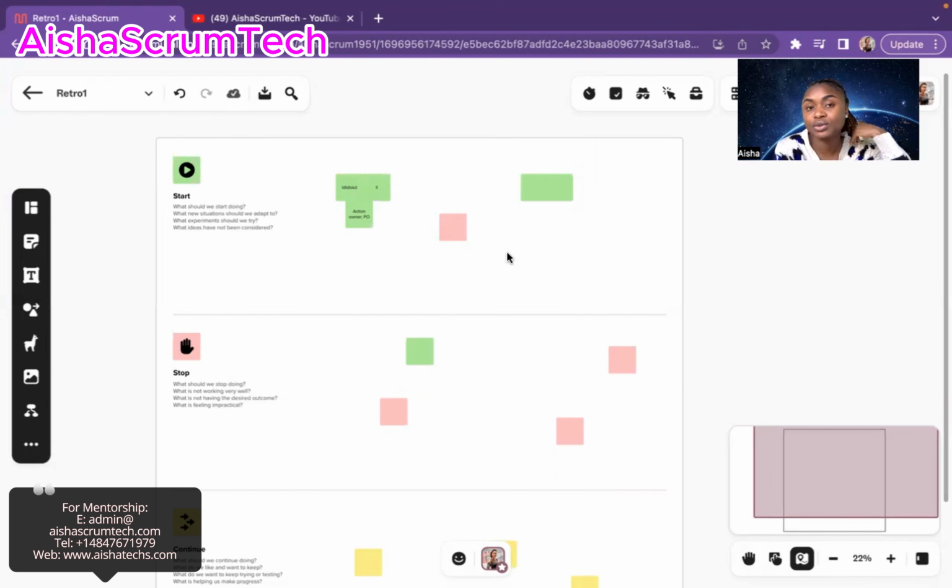It's very important to know the action owner, because later on, if you go to Jira to input that ticket, you're able to assign it to someone that will ensure that the team are able to do that. Maybe for the action item, the user story notes, acceptance criteria not clear, you might have to do one more extra backlog refinement. Maybe if you're just doing it once every 2 weeks, you might have to increase it to weekly, right? So then the PO can have more time to describe and explain the business requirements to the team, and the team will have more opportunity and more time to ask questions around it. Adjust and readjust as it fits, right? So that's just one example.